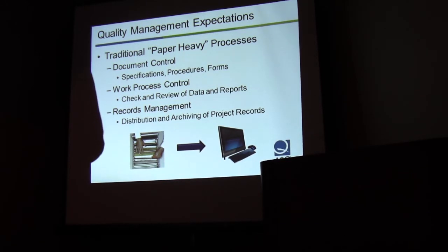And of course, forms. Our data collection instruments are key. If specifications change, your data form may have to change in terms of what was previously considered acceptable. Maybe it is no longer acceptable. Or you might have a situation where, okay, if it's on this side of the room, I only need you to have soil compaction at 90%. But if it's on this side of the room, I need you to have soil compaction at 95%. So you need different data collection instruments potentially to capture that information.